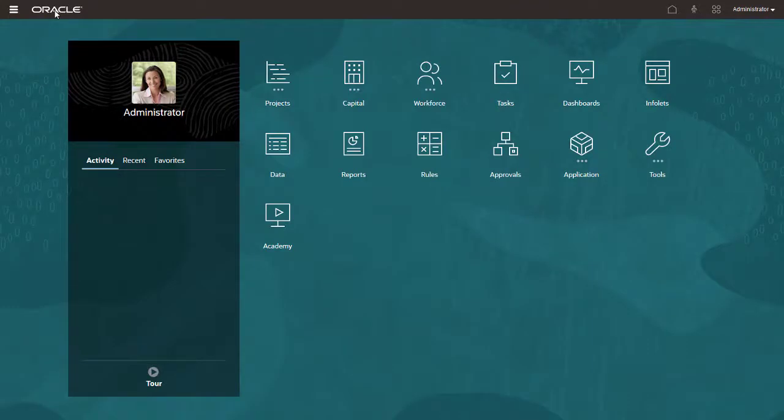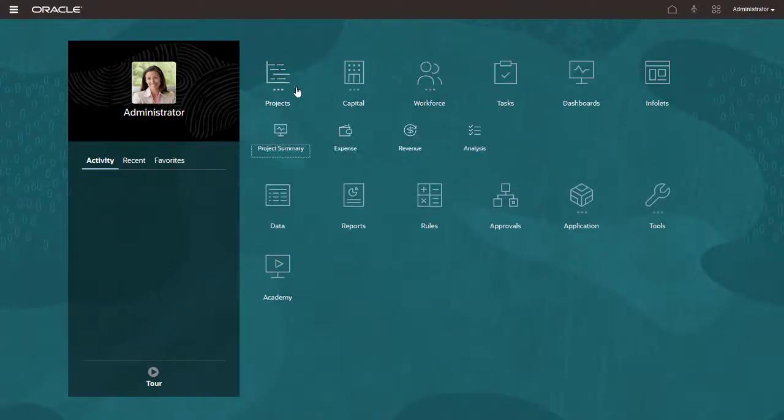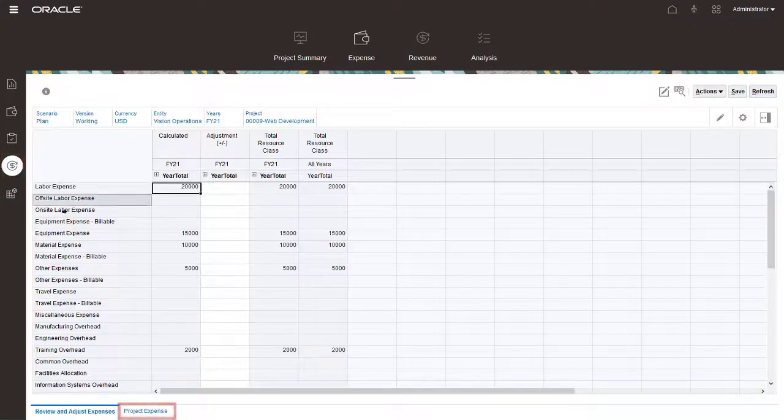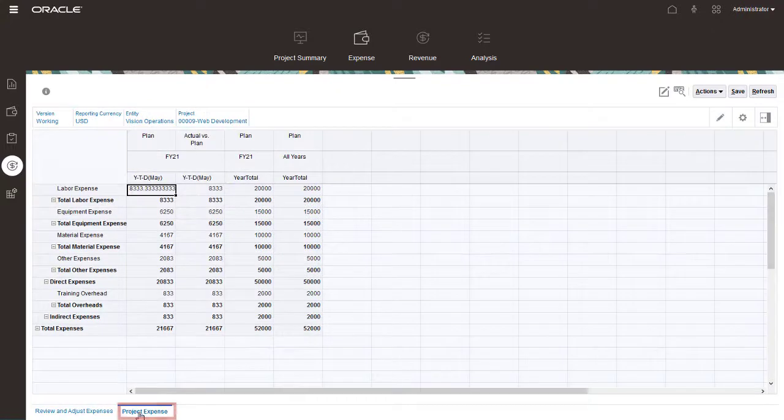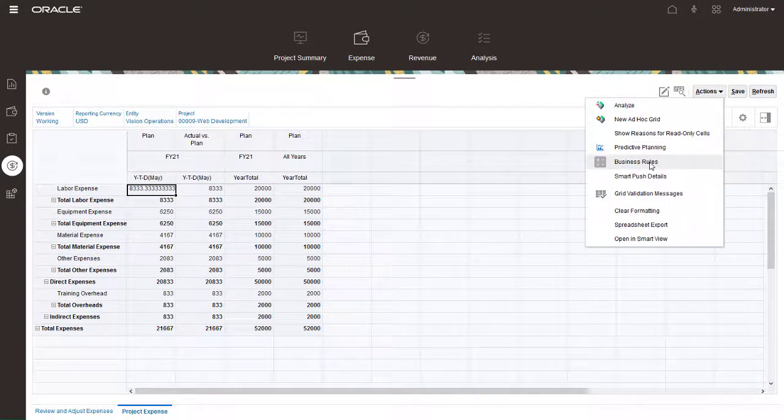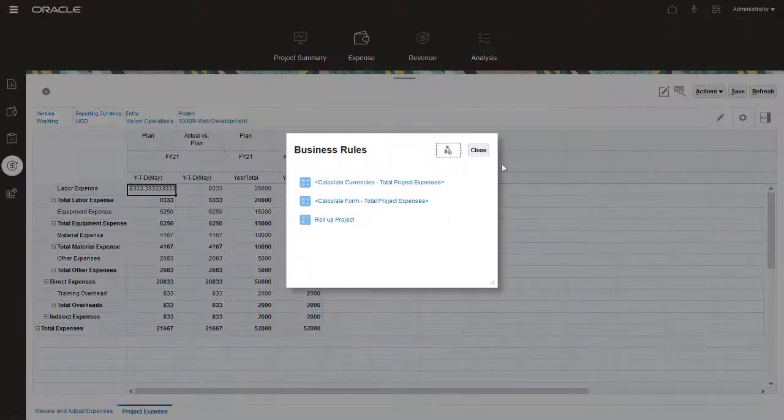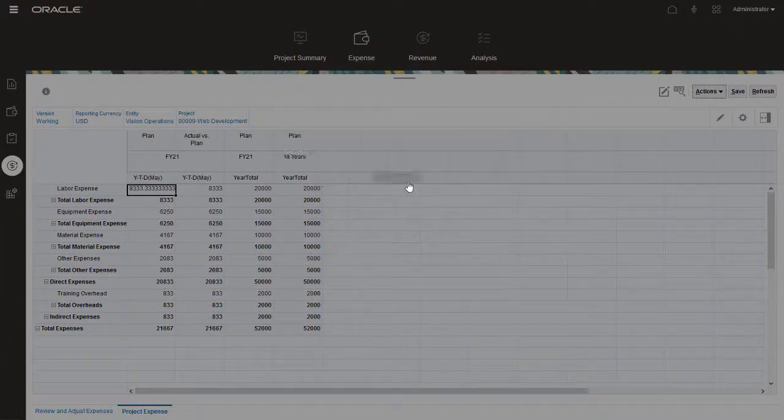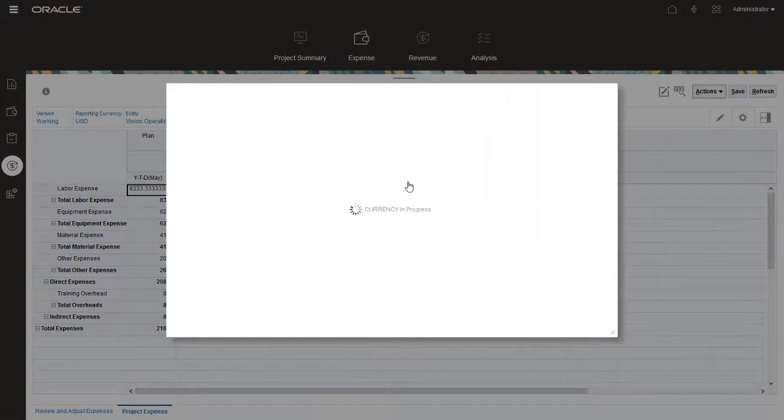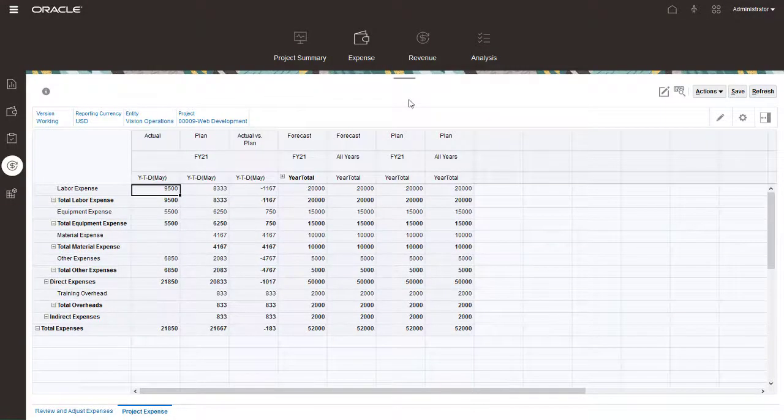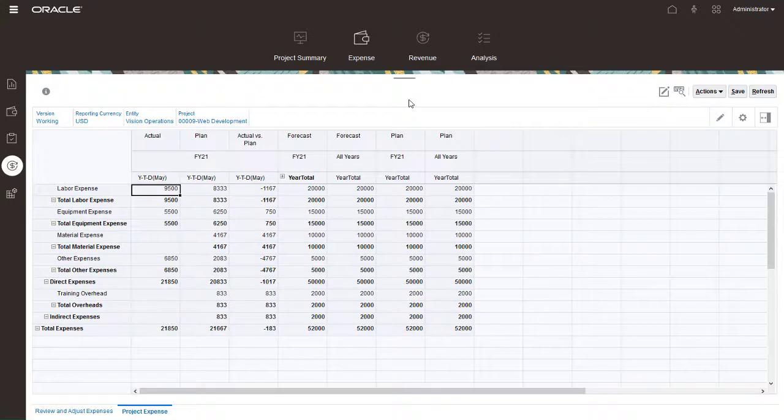Now let's calculate the project expenses. Under Projects, select Expense. Select Review Project Expense, then select the Project Expense tab. Under Actions, select Business Rules. Then select Calculate Currencies, Total Project Expense. Now that actual data is imported and calculated, you can compare plan and actual data in a variance analysis.